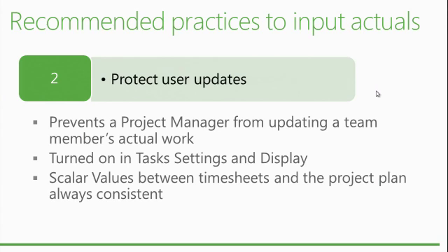So I'm sure you have seen that type of thing happening in your project plans, where the hours entered in the timesheet were not exactly distributed the same way in the project plan. And there are some scenarios where Project Server, the scheduling engine, is recalculating the way the actuals are spread. But overall, when you add up everything, it's going to match.